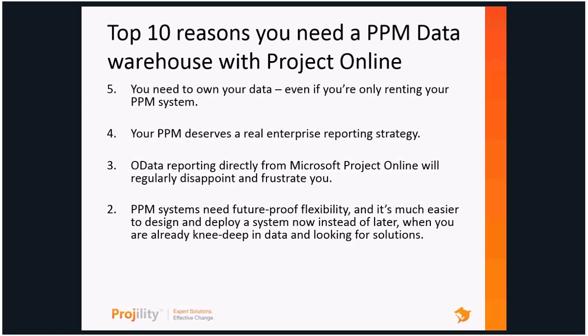And I laid out some of those numbers. If you do 3 years of time tracking with 300, 400, 500 resources, you're up to 15, 20 million records that are in your system. You don't want to wait till that point to start designing a reporting strategy because that can get very, very painful. You want to design your core reporting strategy, your core schema now, and build around that. And that's when you really want to do it, is upfront in the life cycle of your deployment.